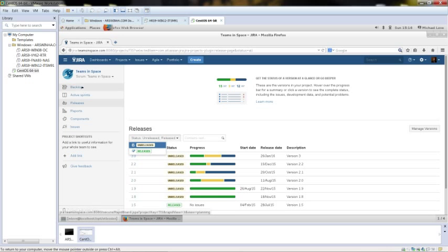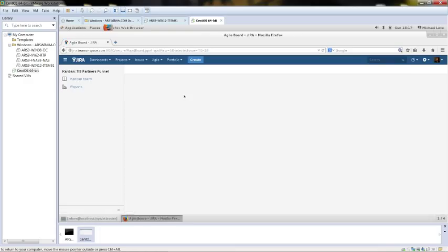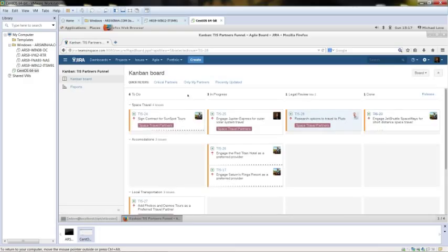Same functionality applies. It's similar to the other. And we also have counts at the top to see how many are in the particular status. For Kanban teams, it's especially important to break items into small pieces, just to get an accurate idea of the throughput. Kanban teams like to limit the work in progress as a means to achieve higher overall efficiency.